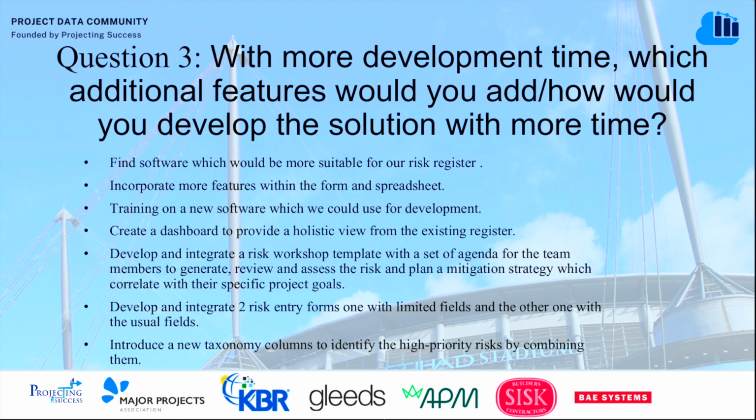So for the third question, first, we create a dashboard to provide a holistic view of the existing risk register. This includes KPI metrics, highest priority risk, recently added and closed ones, and the most business area impacted. Second, develop and integrate a risk workshop template with a set agenda for the team members to generate, review, assess risk, and plan a mitigation strategy which correlates with their specific project goals. Third, develop and integrate 2 risk entry forms. Form A will have limited fields suitable for individuals to record a risk, which will be sent to our